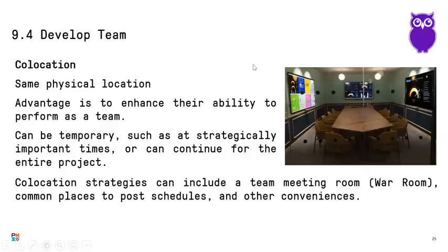Okay. The war room is where I have all my resources, not progress reports, the updates. As you can see on these walls, you have project information all in one area. Like the team members, when they come in the morning, they can go to this room, they will know about the project update, what is the cost until now, what are the resources, what is our plan for the coming day, and what we have achieved in the last week.